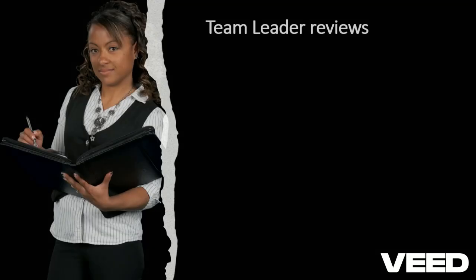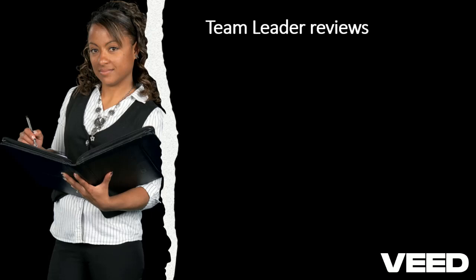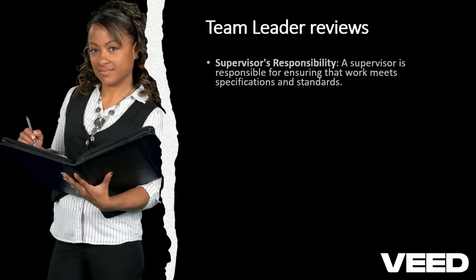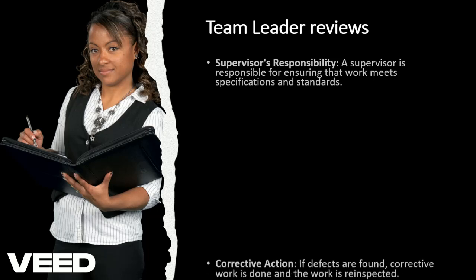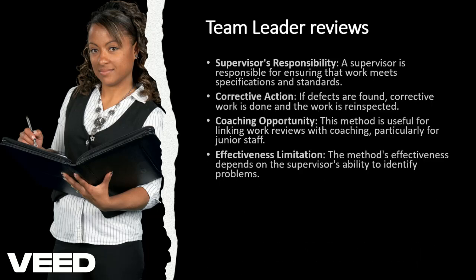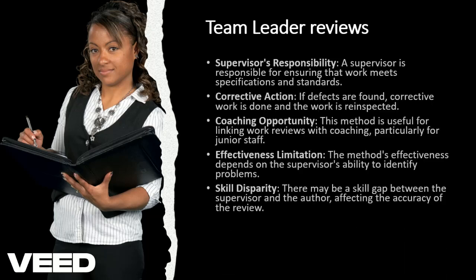The second one is what we call the team leader review. Now, this is a technique that requires the team leader to go through the products that are produced by the subordinates. Depending on the size of the project team, this can be the project manager, or it can actually be a team leader who is in charge. Let's say we have a lead programmer, then they are reviewing the work of other programmers, lead analyst, risk manager, and so on and so forth.